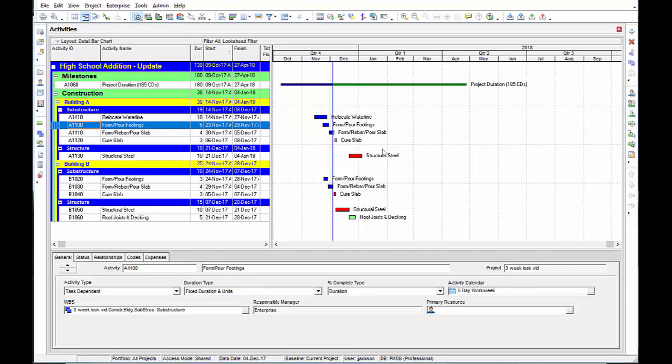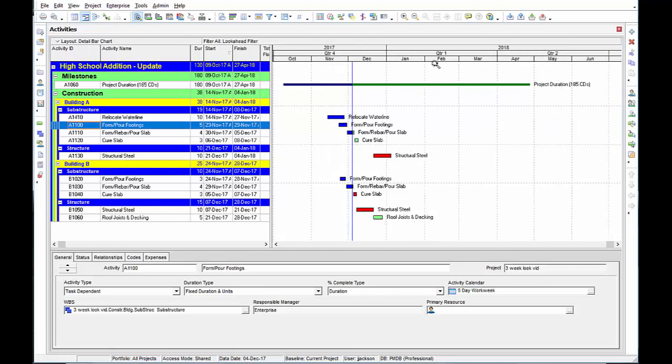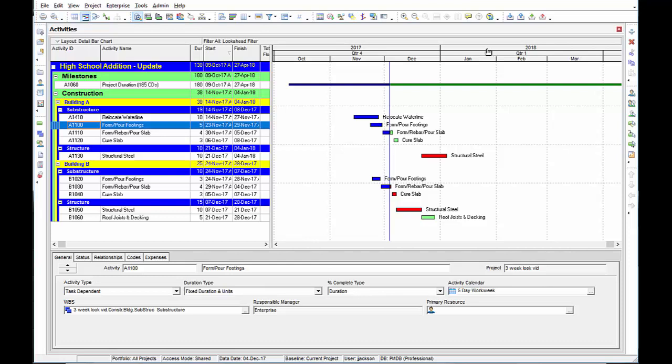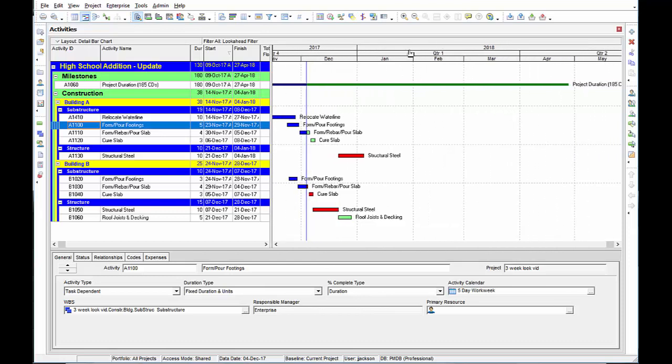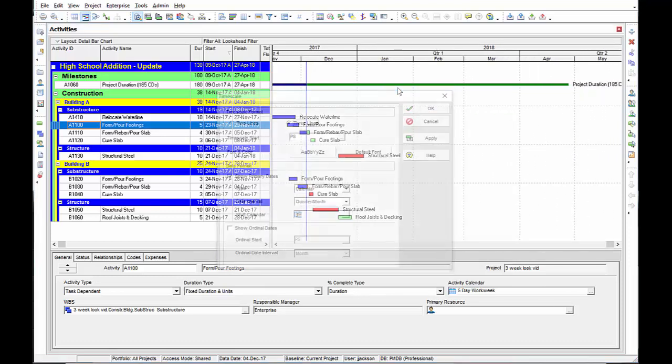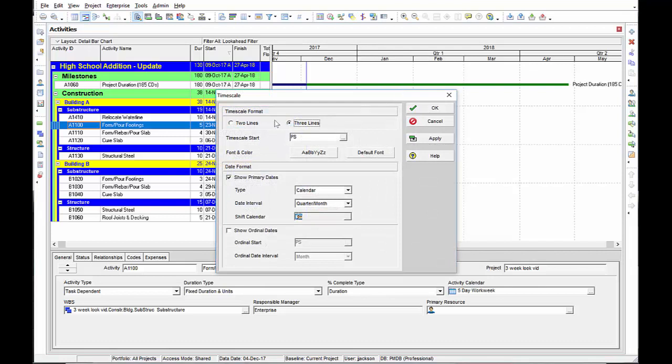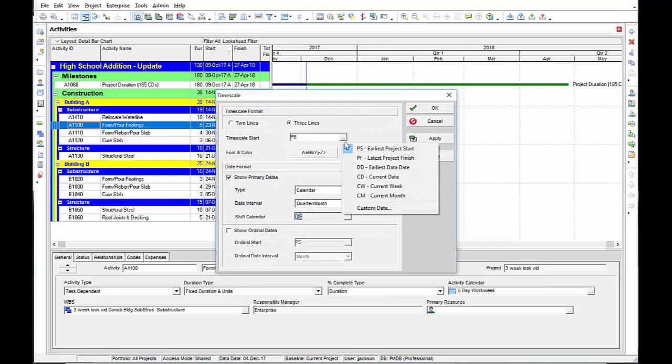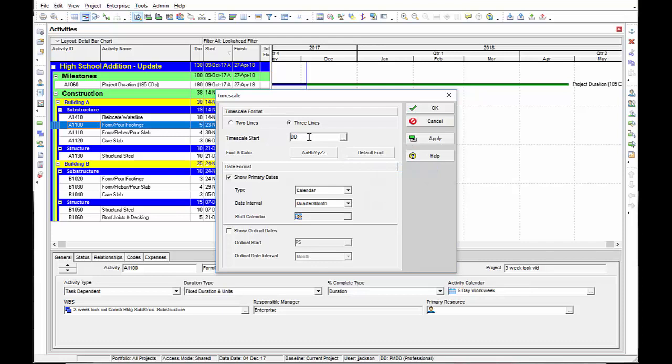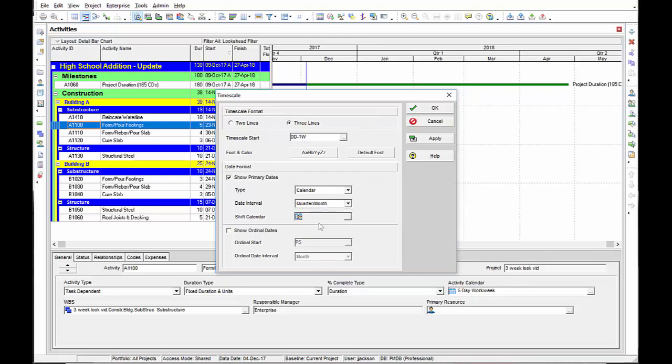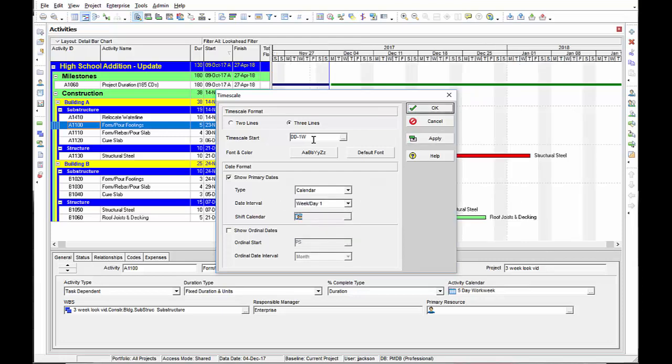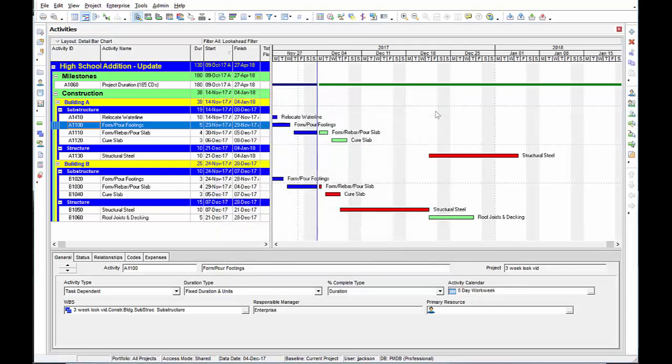Now let's work on the bar chart. Let's spread this out a little bit. Let's start with the timescale. We want the timescale to start on my data date minus one week. That's the beginning of our look ahead schedule. And then I want to make this timescale be able to show the particular days of the week. So I'm going to select my date interval as week and day.